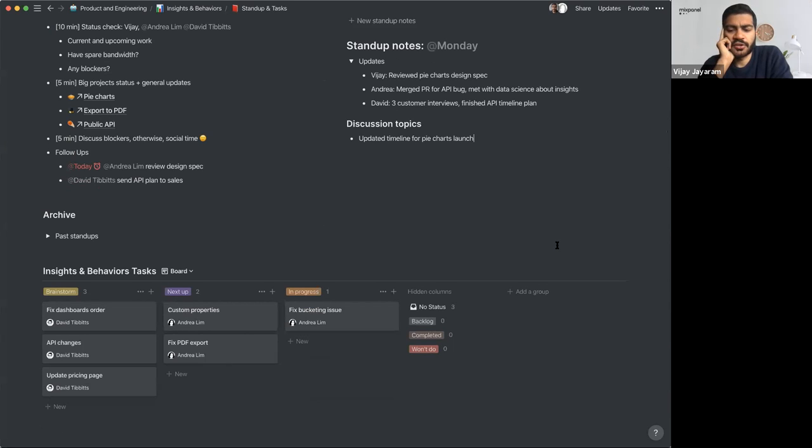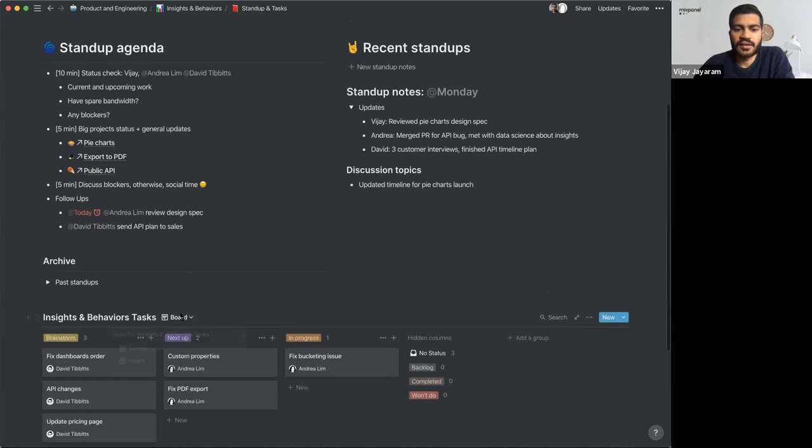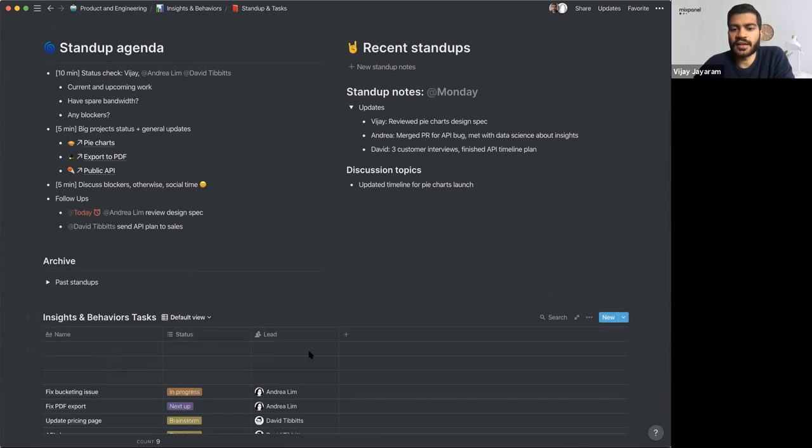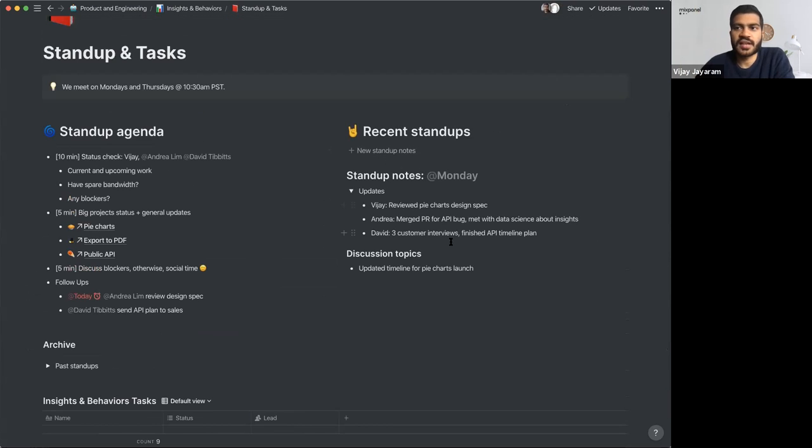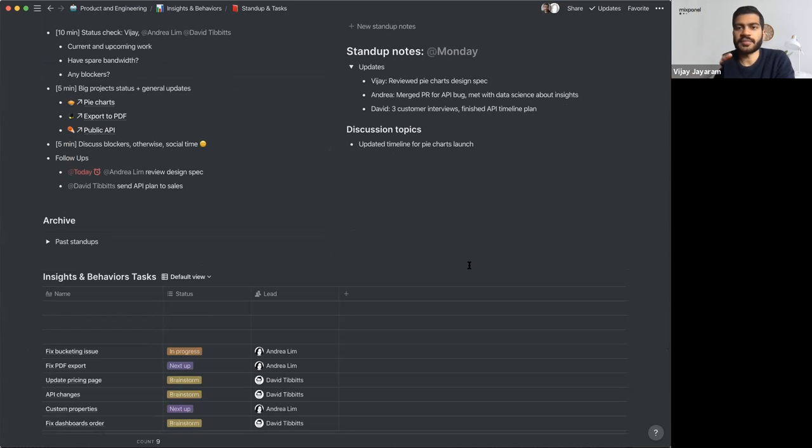I think we could achieve that effect if we viewed this as a table and had an automatic field for when it was created, and then at every stand up where the task is still going, we could update it with how many hours were spent. Again using the rollups feature, join it to the project roadmap table and figure out how many hours were spent collectively on this. We aren't quite that organized, but that's definitely possible.